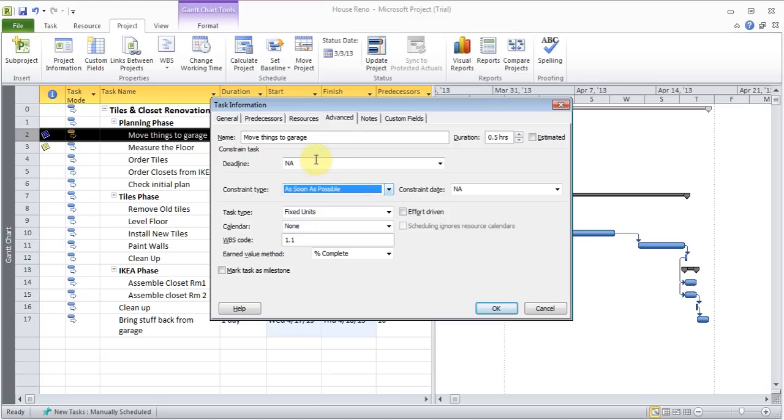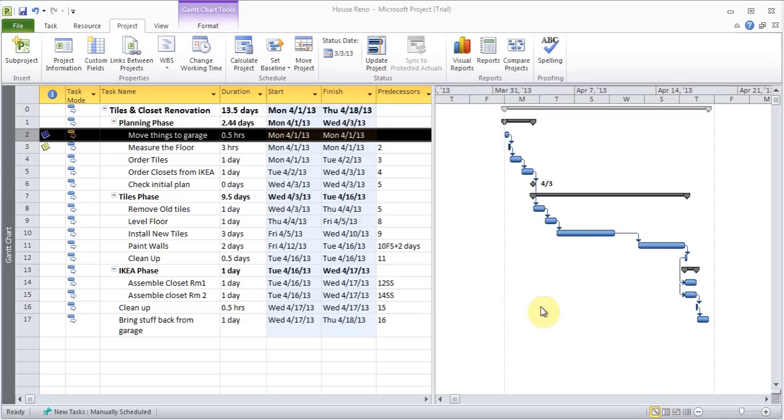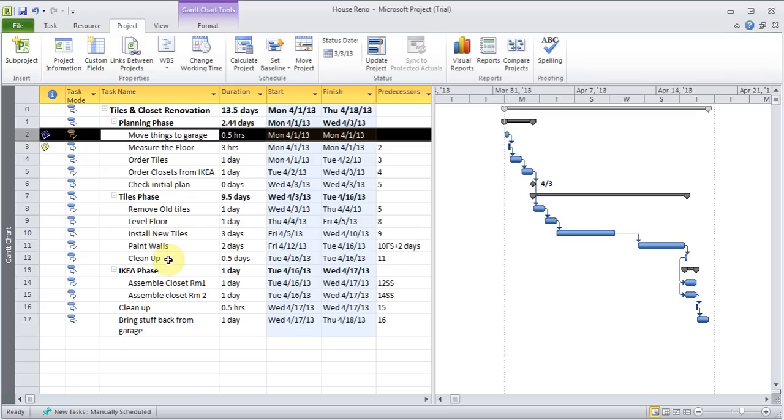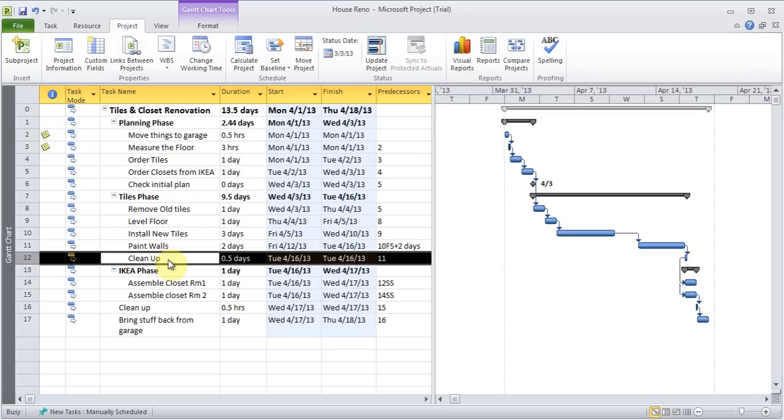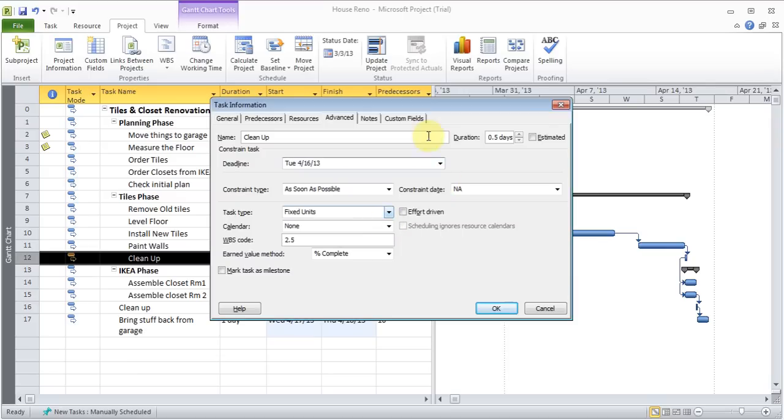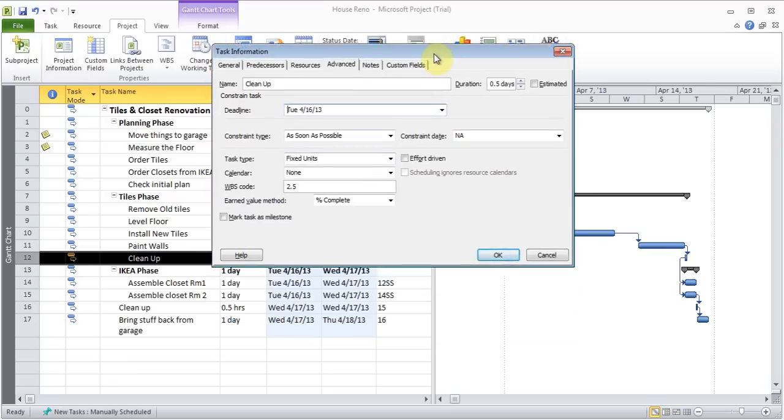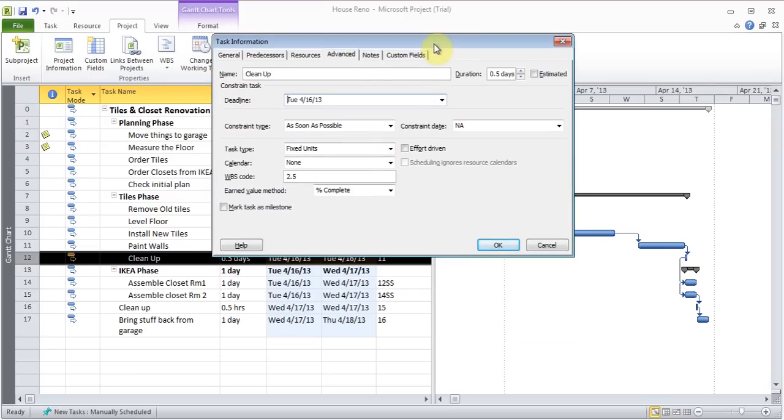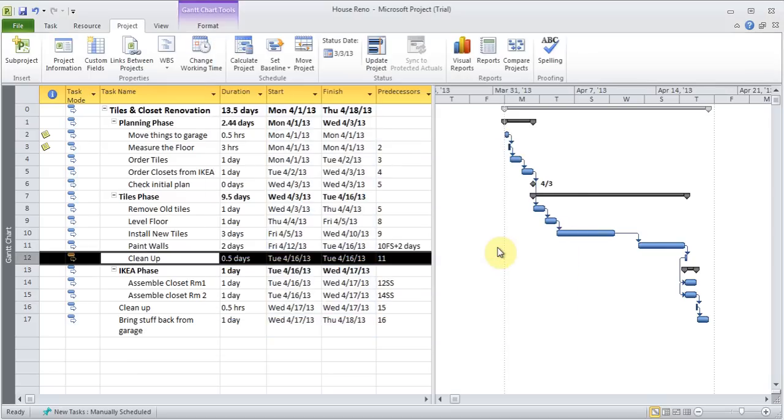The other thing is, there is a thing called deadline. And for this one, let's pick something. So this is the clean up here, which is the 16th. So I can click on it, and I can set a deadline for the 16th of April. Click OK, and the deadline mark comes up. You see that green thing there.